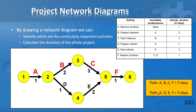In path A-D-E-F, which is five days, if one of those activities — say activity D — were extended from one day to two days, the path would go up to six days but would still be less than the critical path. A project network diagram teaches us to focus on the activities on the critical path when looking to improve a process by shortening duration. For example, reducing task E from two days to one would have no effect on the overall duration — the project would still be seven days.